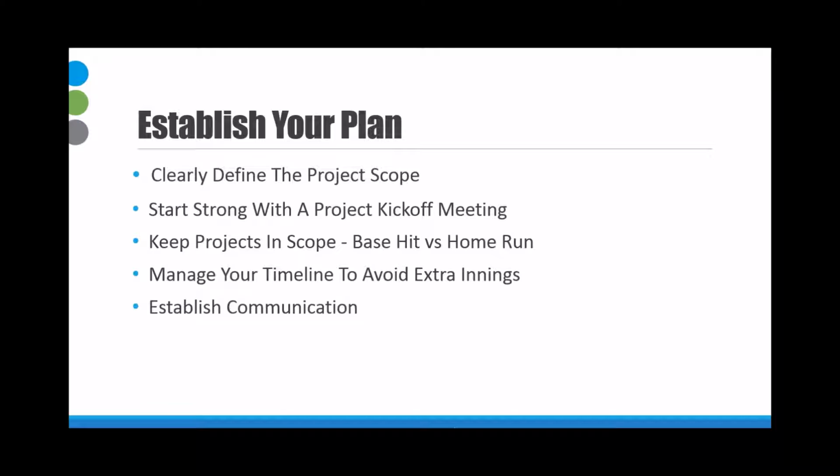And that leads into the next step. You want to avoid extra innings. Remember that picture that we looked at just a slide ago? Set a project timeline and stick to it. Be dedicated to getting the project done on time, on budget, and within scope. If the project extends too long, it will certainly jeopardize user adoption. It's better to actually launch phase projects than to extend one phase too long and disengage your project team.